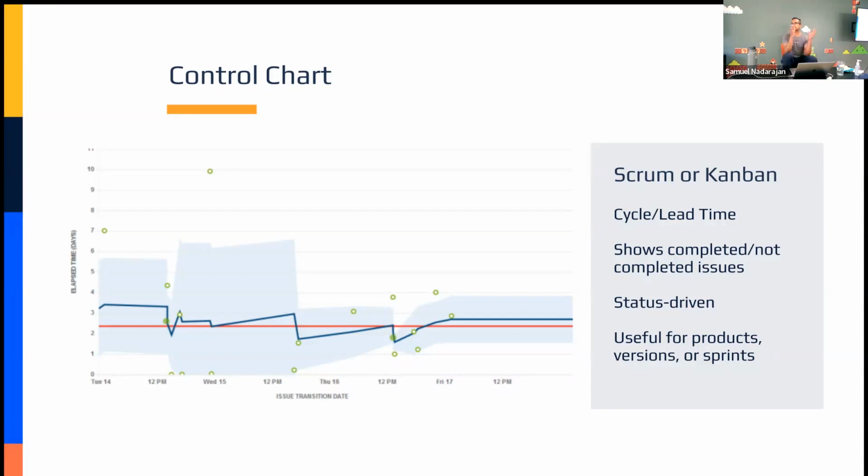And it will calculate the average cycle time for just that subset of data. And then it's going to plot that on your blue line right here. What that blue line is telling you is that at various points in this timeline, the closer your blue line is to your red line, that tells you that the cycle time for your team is close to what you would expect if you were trying to forecast like, a completion or an end date, right?